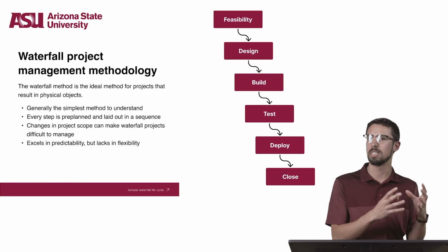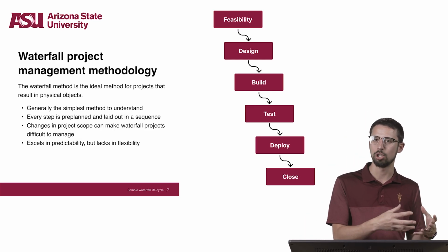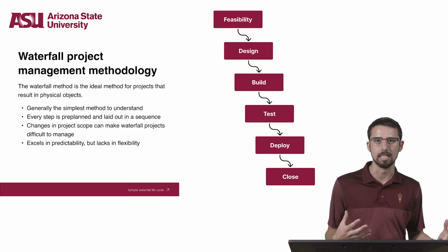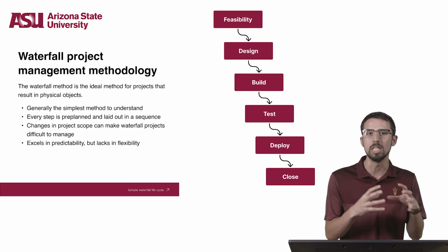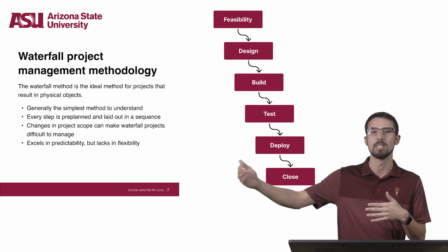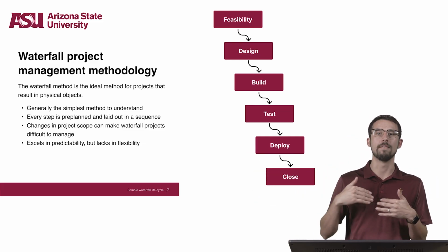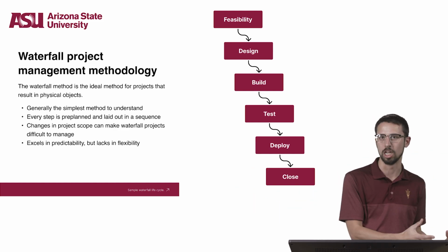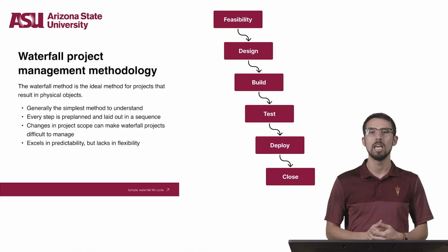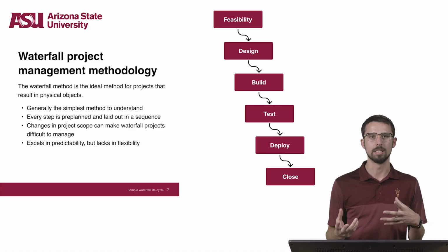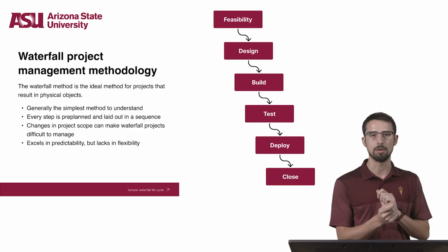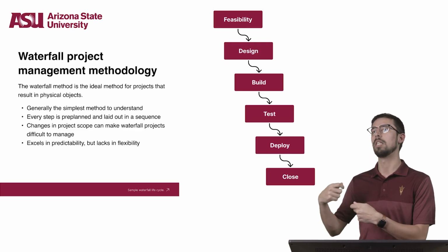While this may be the simplest method to implement initially, any changes in stakeholder needs or priorities will really disrupt the series of tasks following it, making it very difficult to manage a much longer project, especially if there's a lot of changes in the beginning. If you've ever heard the phrase change order, this typically means that something a stakeholder asked for likely changed the